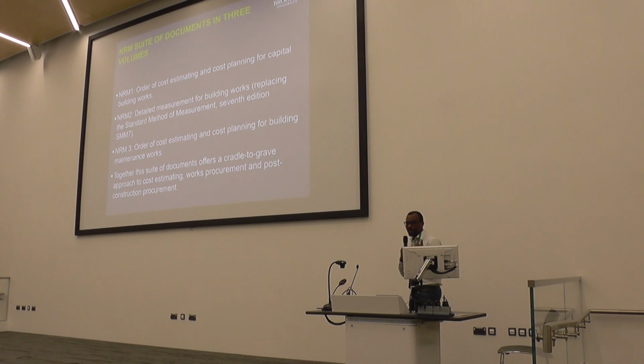Because take note, at the very front end, when you're planning your building, it's still very much at a concept design stage. You probably have just the floor area. The architects and the structural engineers or consultants are now coming up with detailed design. The quantity surveyors are yet to come up with detailed bills of quantities. So at this very stage, the NRM1 helps you to pre-estimate all the cost of work.